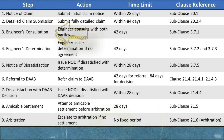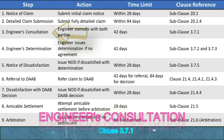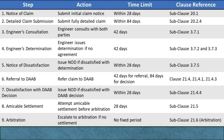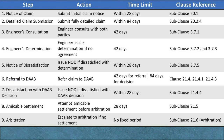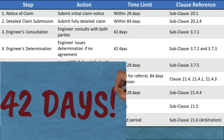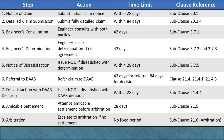Step 3: Engineer's Consultation (Subclause 3.7.1). Action: Upon receiving the fully detailed claim, the engineer initiates a period of consultation with both the employer and the contractor, aiming to facilitate an agreement on the claim. During this period, the engineer engages both parties in discussions to reach a mutually acceptable resolution. Consultation time limit: The engineer has a period of 42 days from the date of receiving the fully detailed claim to conduct the consultation and attempt to reach an agreement.